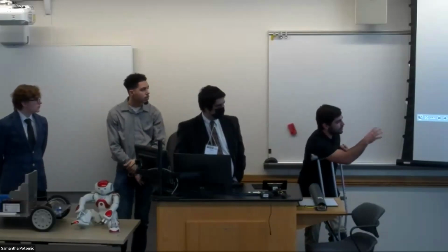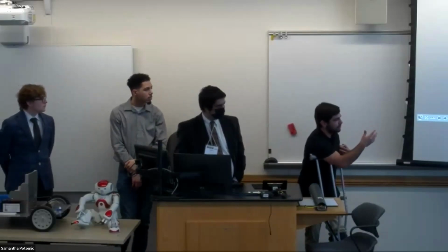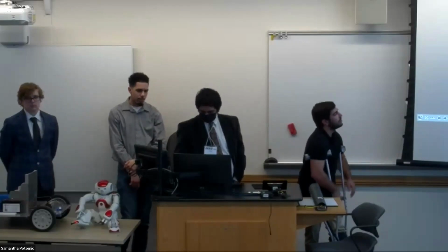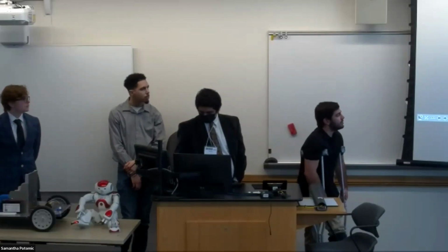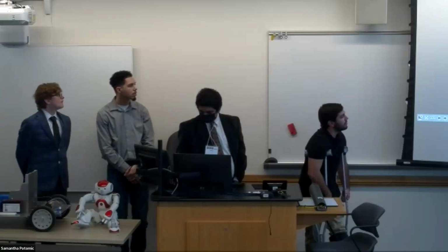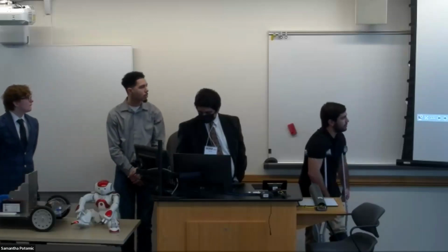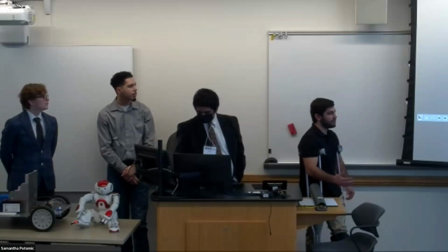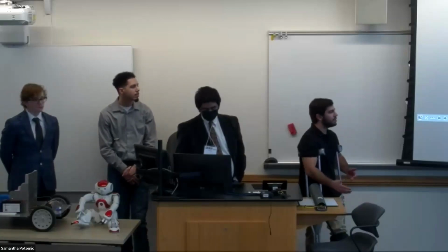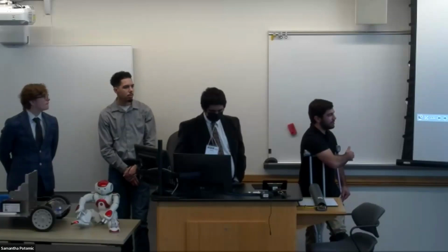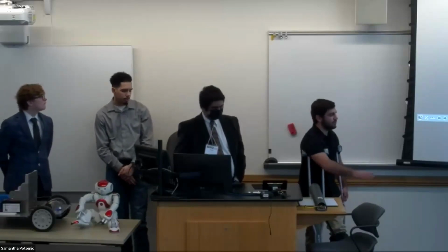So this is all completed within the previous semester, which was, like I said before, building the chassis and then making it become remote controlled through the phone. So now going to next semester, we can see that where the red line is where we are today, around mid-March. And right now we're on the task to design the neural network, which will then become the autonomous. And then once that's done, last few weeks of the semester, we want to do fine tuning just to make sure everything is running correctly for the final presentation. And then documentation, we have to do that from the beginning of the semester to the end of the semester. So that goes on the whole year.